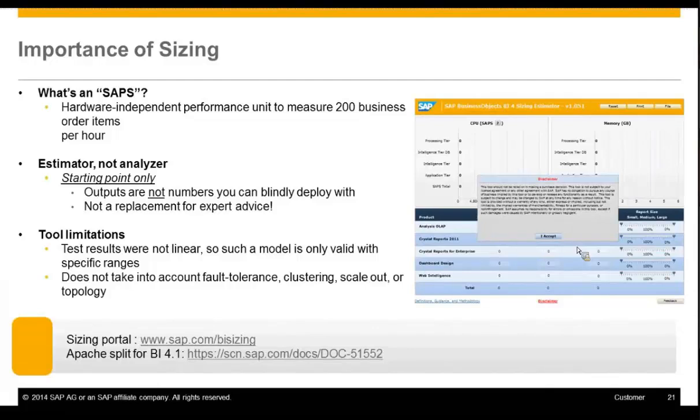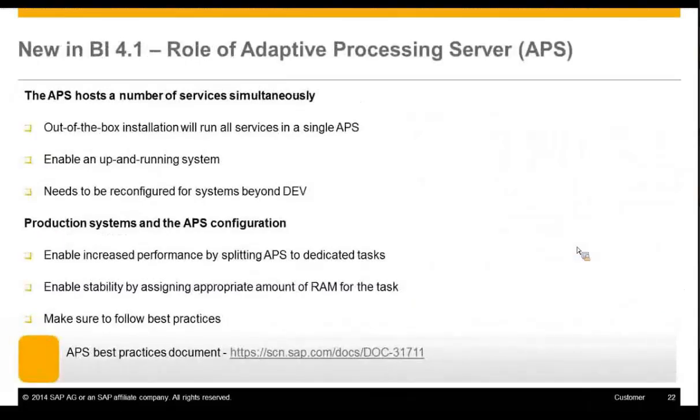Sizing is not just running the tool per se, right? The tool will give you an estimation, but eventually you have to take that as a guideline, analyze it, expand it, and review it, and make sure you size the environment carefully so that it will support your requirements and also support the changes in the product. Okay.